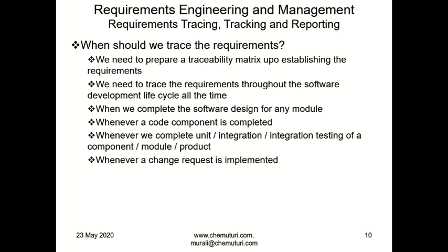We have to continuously update every phase, every completed phase. We have to update, and we need not wait until the completion of a phase. If we complete an artifact, code artifact or document artifact, we need to update the traceability matrix. This is an important function of the project manager.